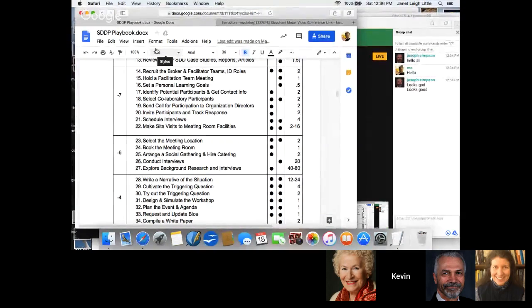And I derived an empirical equation that would tell you, given how big you expect the event to be in terms of the number of ideas and the number of people, how big a facilitation team you will probably need. It was usually three to six people, although in the rare case people would do facilitation with one or two people, and those are very senior, very experienced facilitators.